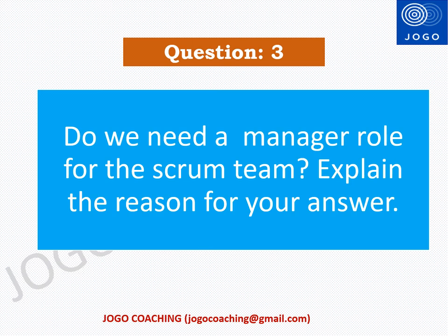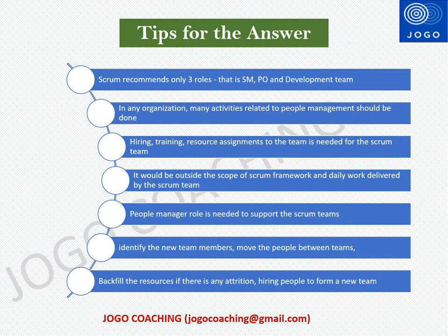Let me give tips to answer the third question: do we need a manager role for the Scrum team? This is one of the important questions asked in a Scrum Master interview. The Scrum framework recommends only three roles — Scrum Master, Product Owner, and Development Team — and does not mention any other roles. However, in any organization, many activities related to people management need to be done to enable Scrum teams, such as hiring, training, and resource assignments. To address these people-related needs, a person in the organization is needed, so a people manager role is needed for Scrum teams — but it would be outside the scope of the Scrum framework and the daily work deliverables of the Scrum teams.